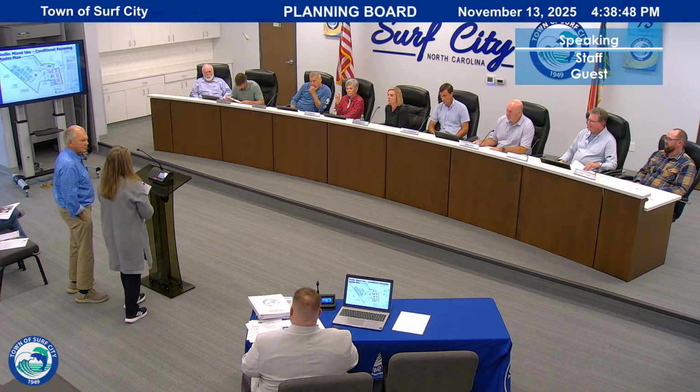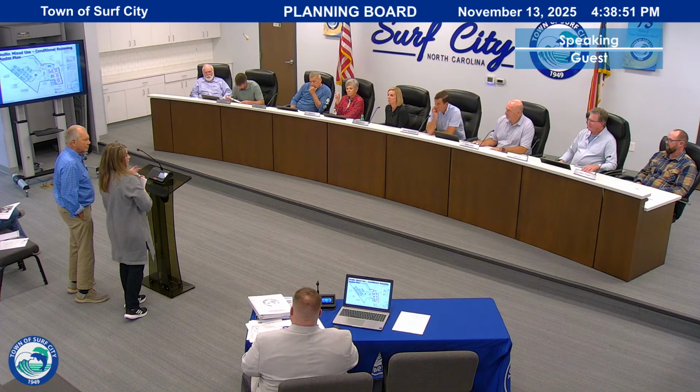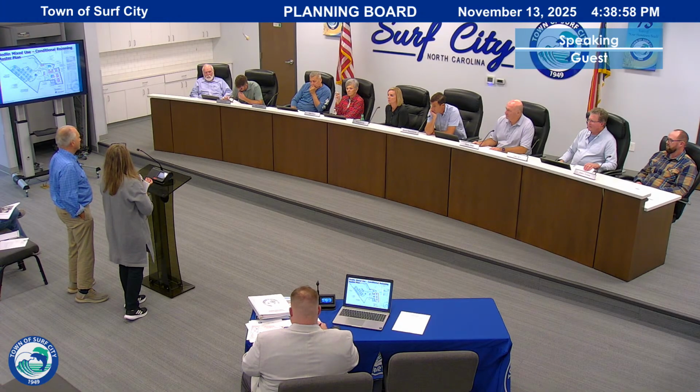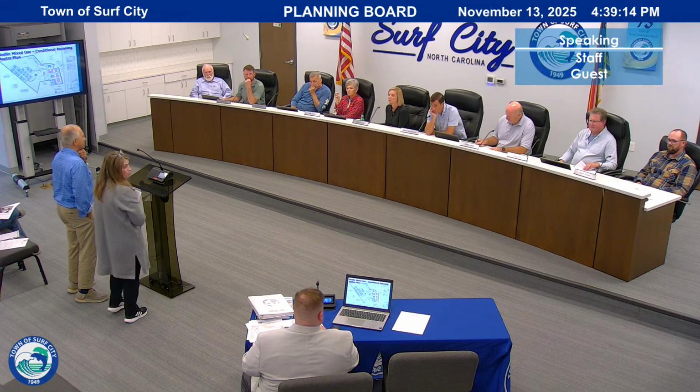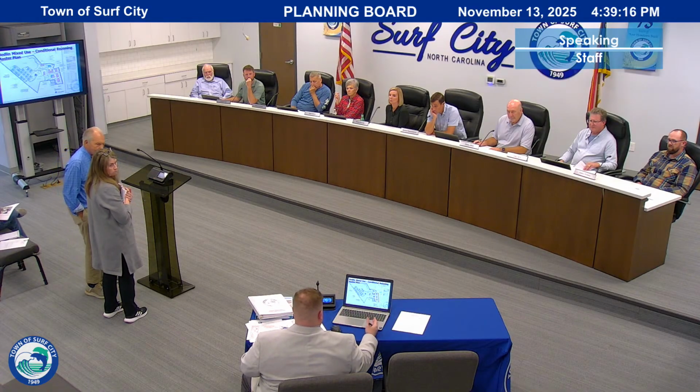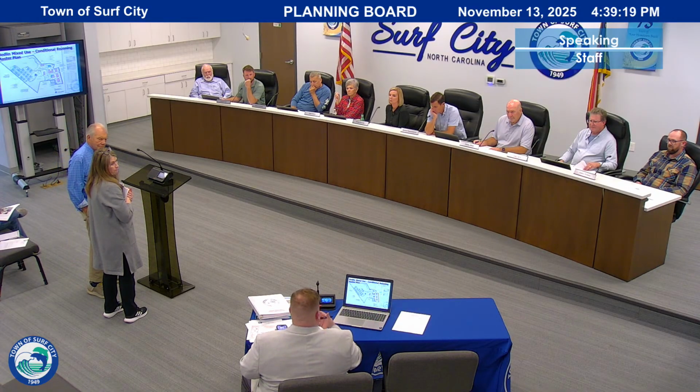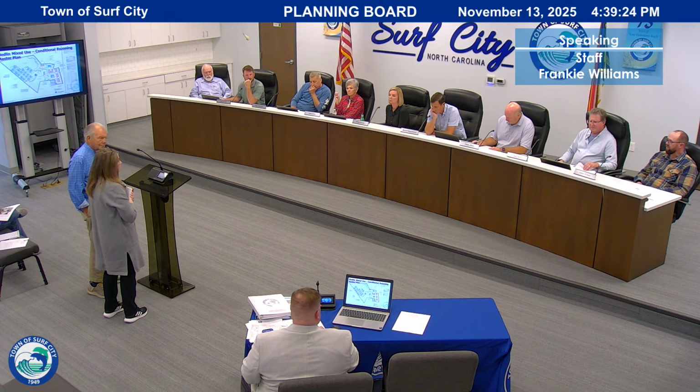And I think part of the reason why we did the townhomes in back as part of phase one is sometimes the rooftops generate the interest for some of the commercial. So if we were able to do the commercial buildings up front and maybe start a couple of the townhome units to help balance that upfront cost of development, that might be a consideration. Would you be willing to? Yes. You may identify a comparable ratio as you bring commercial on, and we could look at that. Maybe 2 townhomes for every commercial.